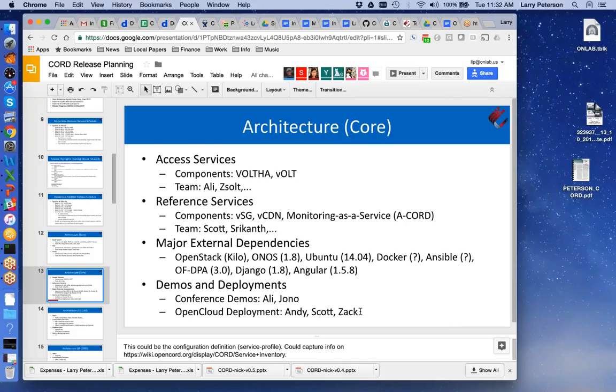How do we manage these dependencies? How do you mean? Well, my main observation is that we do have to schedule time to upgrade. Just take Ubuntu or upgrade from Kilo. We need to schedule time to do that. It needs to therefore be prioritized with everything else.